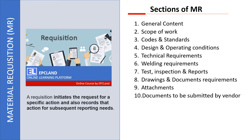Material requisition is a very critical deliverable in piping engineering. It is a summary or collection of all the technical requirements which can be shared with manufacturers or suppliers in a format so that they can understand the actual requirements — with respect to quantities, materials, dimensional design or material standards, delivery schedule, and documentation.